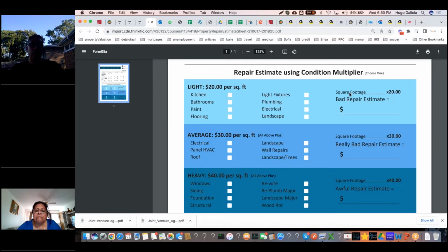So a 1,500 square foot property will spend about $50,000 to $55,000 on the rehab. Super important to always have a cushion, because you always want to be under budget, because oftentimes all these unexpected items will make you go over budget. But if you have this cushion, then your numbers are still going to work.